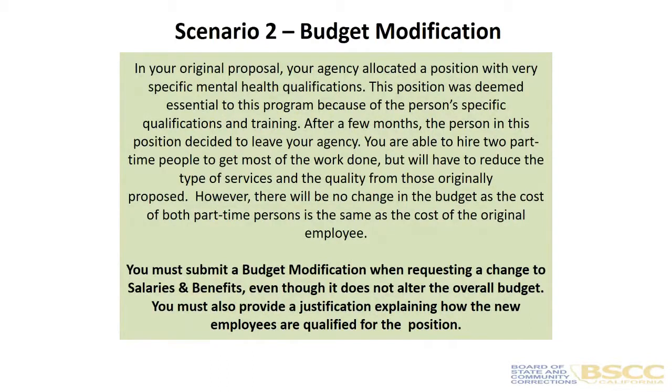You will still have to submit a budget modification. And the reason being is because you're making a change to the salaries and benefits overall. And then also, you will have to provide us with a justification of how these new hires are going to be qualified for the position.